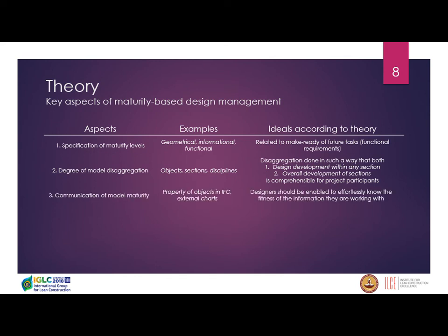Now, the third aspect, as I mentioned before, is that it's vitally important in design that designers are enabled to pull the information that they need from the partially completed designs of other designers. But in doing so, it's also very important that they are enabled to know the fitness of the information that he or she is working with. So what this means is that there needs to be a sound approach by management to communicate the current model maturity state to the designers as they are working.